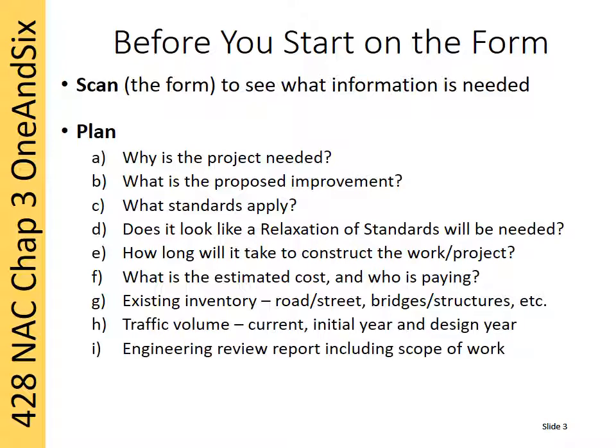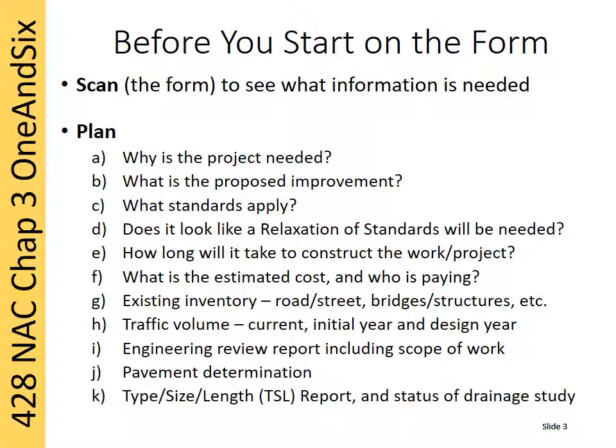You won't always have an engineering review or a pavement determination or a TSL report available when you complete the form. It is good to be as accurate as possible. You want your planning process to have integrity, and after all, it is a public record. Of course, as the project gets closer to being added to the 1-year plan, you can make revisions. You just don't want the project to be advanced to the 1-year plan and then find out the cost has doubled.